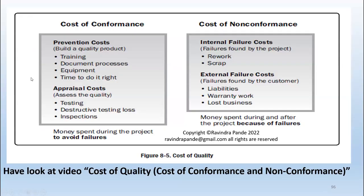We need to understand what is the cost of quality, or cost of conformance and non-conformance. Here we are trying to understand whatever efforts we put in retrieving, maintaining, controlling, and enhancing quality throughout our project progress. This is normally referred to as cost of quality — measured in number of efforts rather than dollars. It includes all effort put into reviews, audits, building templates, and the knowledge management process.